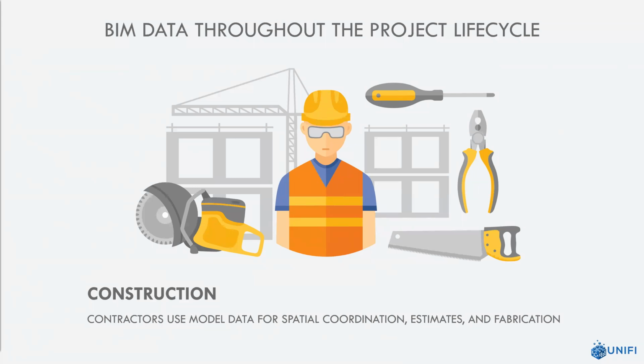And just to add to the concept of using data to communicate project requirements, oftentimes contractors will even refer to the data within a design model to get a better understanding of design intent. Now, on that note, one word of caution is in our space, it is actually a known fact that data within a design model can contain inaccuracies, at least in the US, where we don't have strict government mandated standards. So you will see construction teams still working off of drawings, as those are the contract documents, not the model. So I do want to put that out there as a word of caution. I do hope that we get to the point where model data is as valuable as drawings someday.